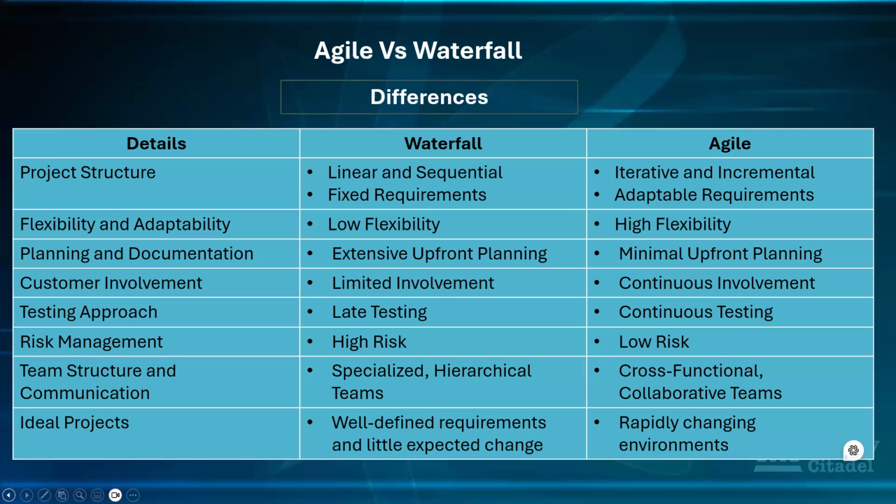So there's absolutely nothing like, oh, we want to change. If we wanted part of the pillars that are carrying the bridge to be curved, halfway through we can't say, oh, we don't want it curved anymore, we want it straight, because the foundation has been built for a curved pillar. You can't just change it because of the resources that have gone into it. But when it comes to Agile, it is suited for projects that have a rapidly changing environment. You're looking at the IT world, you're looking at software projects and all that.